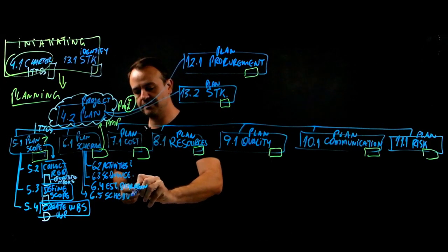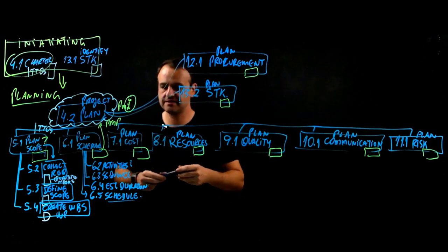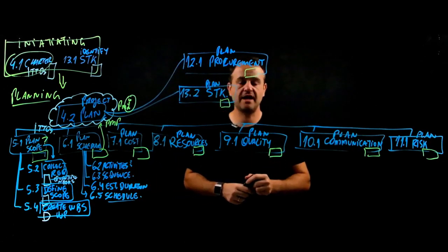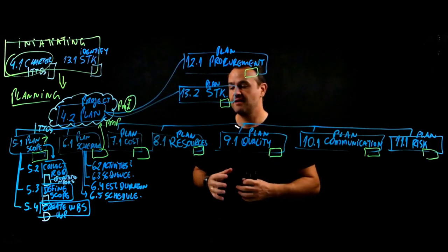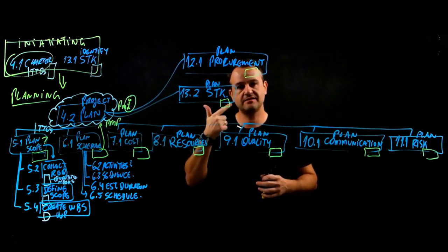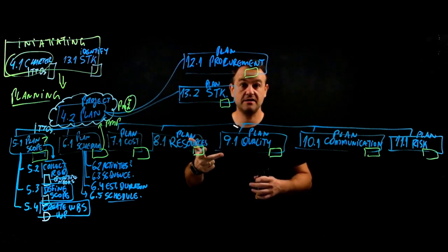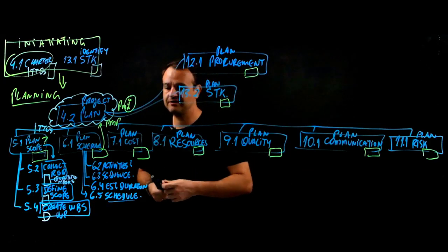Actually, you're building the schedule, develop the project schedule. You're building this as you're doing the other processes in the knowledge area for schedule. But it's important that we have this as a separate process, because in this schedule you're going to think about constraints, what if scenarios, you're going to do resource leveling, for example, solve over allocation in case you have, and then you have the schedule.